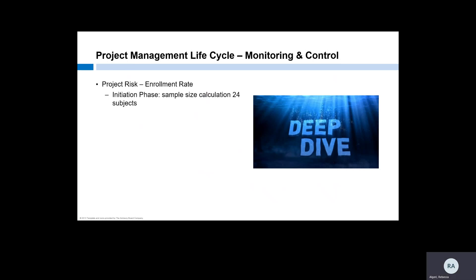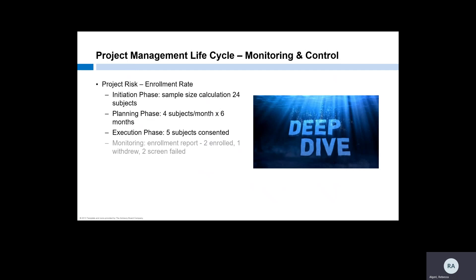During the initiation phase, the sample size calculation determined that we needed 24 subjects to power the study. During the planning phase, we established our anticipated enrollment rate at four subjects a month over the course of six months. We executed the study and started enrolling, documenting subjects that were consented in our study database and marking whether they went on to be randomized, withdrew, or screen failed. We consented five subjects during the first four weeks. To monitor our progress, after the first month of enrollment, the CTPM pulled an enrollment report from the database. According to the report, we consented and screened five subjects: two went on to be randomized, one withdrew consent, and two others were screen failures.